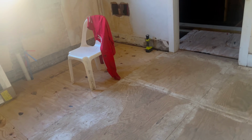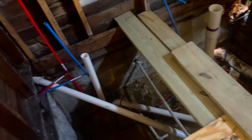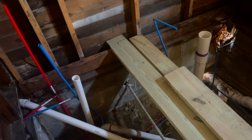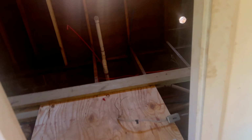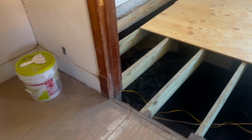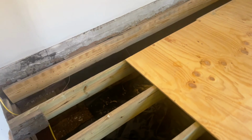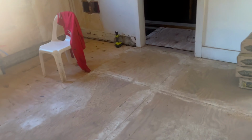And when the order came in, half of the stuff was totally wrong. The shower pan that we ordered, they gave us the real small square one instead of the long 60-inch. So they ended up returning that. The door that we ordered for the bathroom was not even on the truck at all. So they forgot the door completely. And obviously the water heater and a bunch of other stuff. So right now we're simply waiting on stuff to be delivered from Lowe's. We're waiting on the water heater, flooring, and some other stuff as well. Hopefully Monday, everything will be delivered on time.